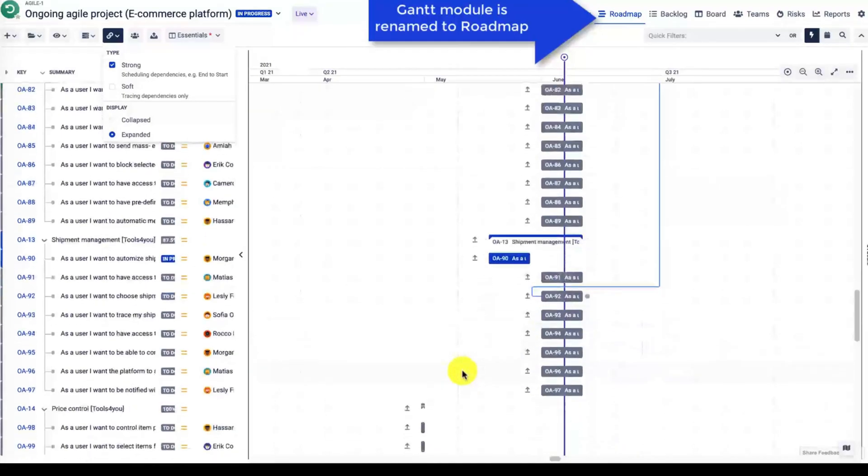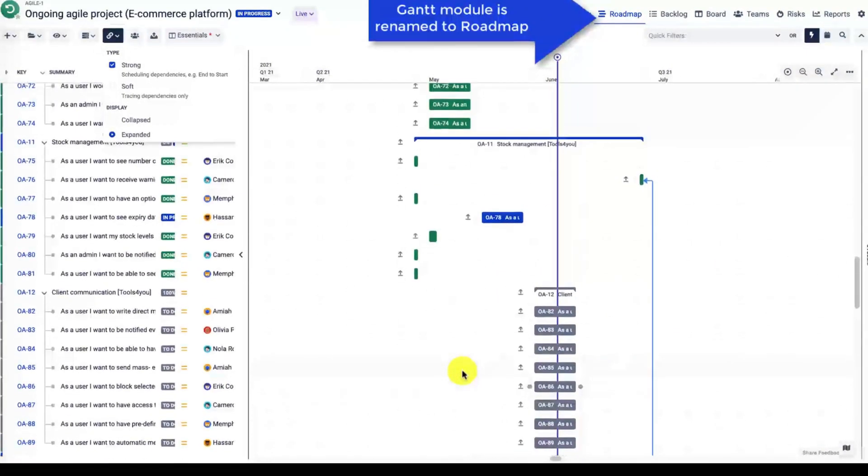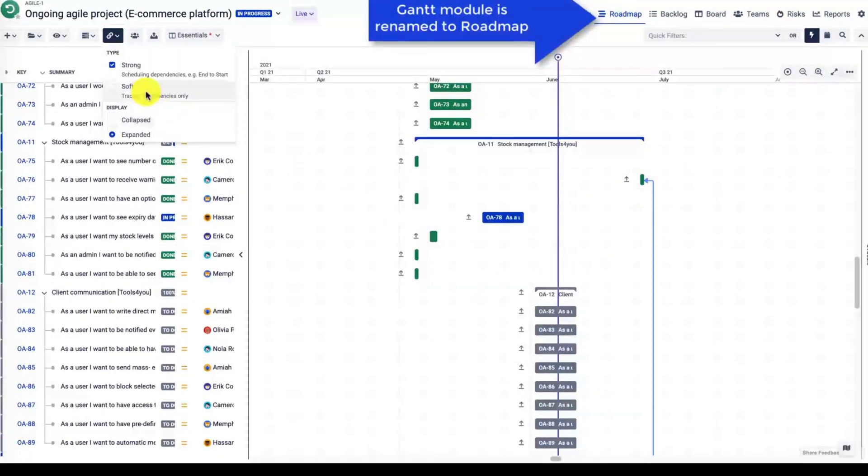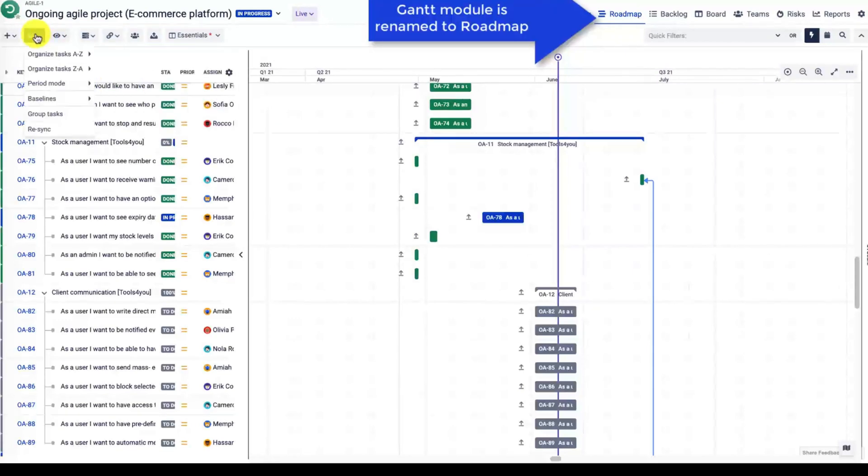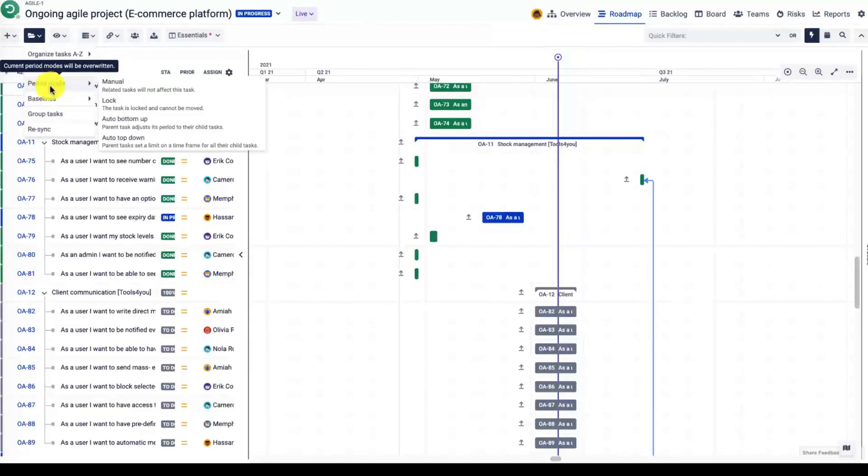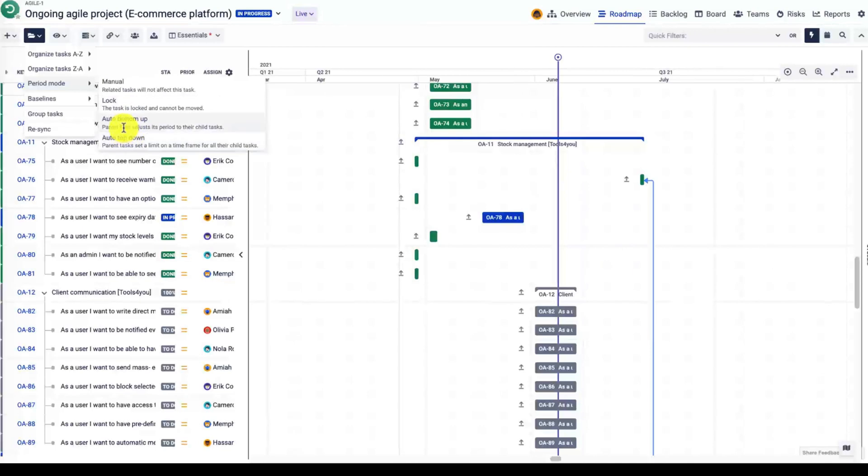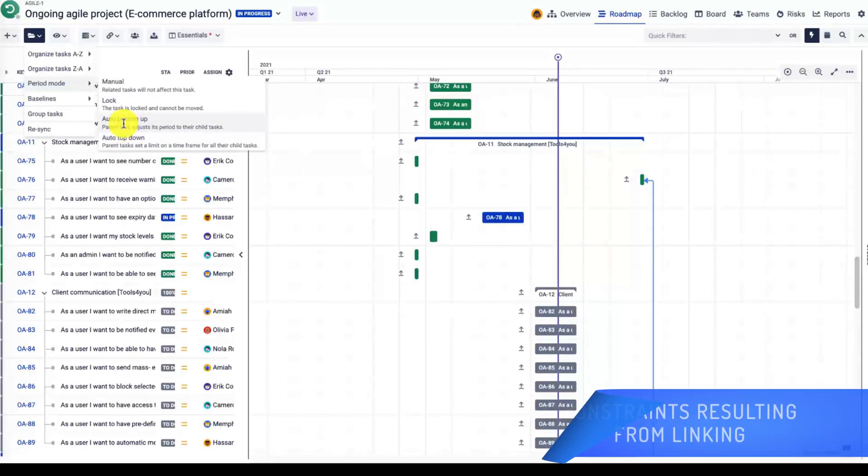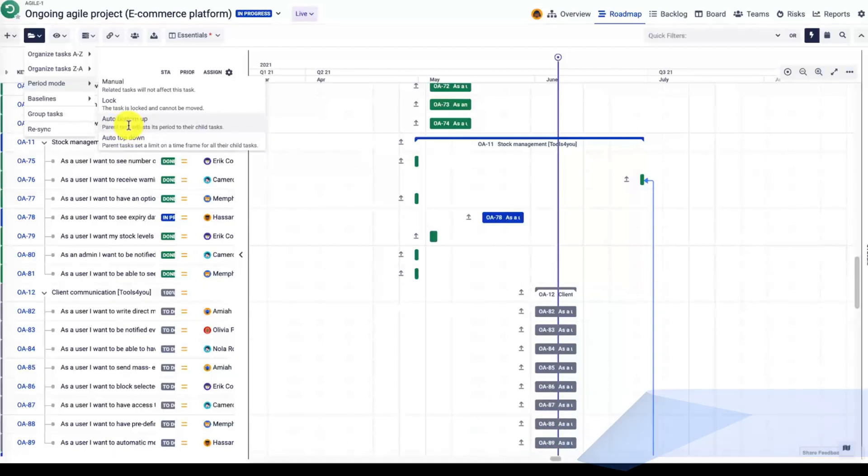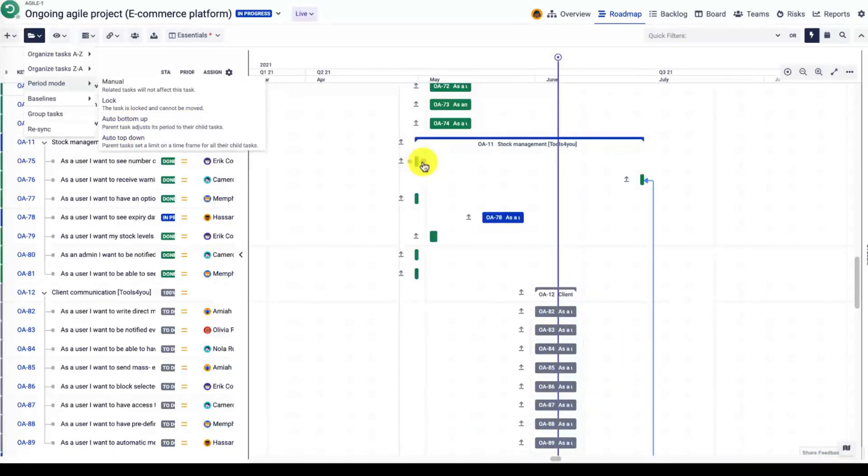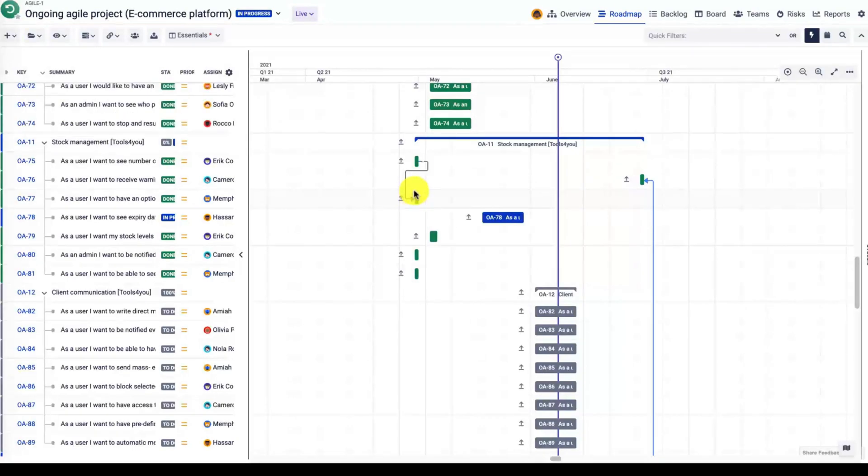You can also collapse the links, in which case you will not see the line but you will only see that there is a dependency. Remember that these are the constraints that might prevent you from moving the task. Whenever auto-scheduling is enabled, you will see that the linked issue—auto bottom-up or auto top-down—the linked issue will be moved accordingly.